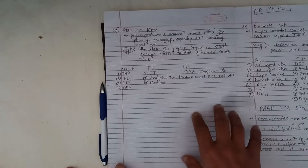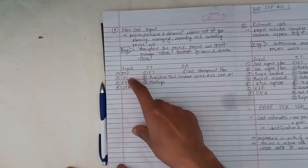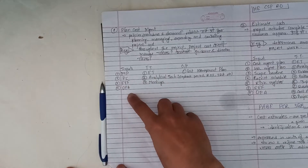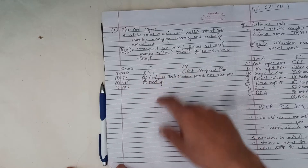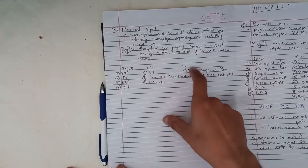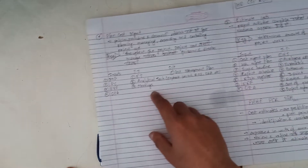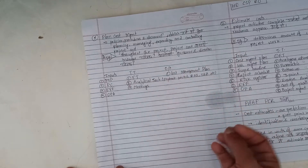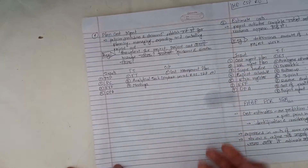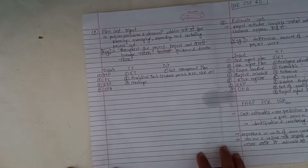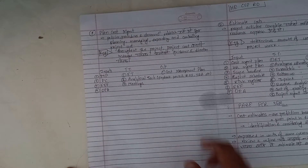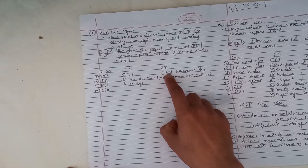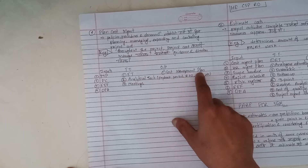The inputs are the project management plan, project charter, EEF, OPA. Tools and techniques include expert judgment, analytical techniques, and meetings. Analytical techniques include payback period, return on investment, internal rate of return, etc. The output is the cost management plan.